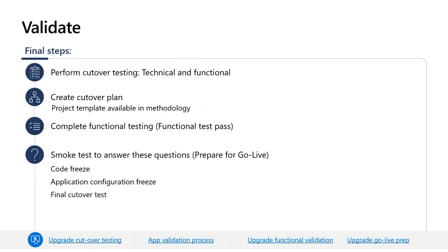Functional work stream. So after data upgrade, several configuration tasks will be required in the FNO environment. All these tasks must be documented and quantified, and a resource must be assigned to them because they must fit together with the technical tasks within the business downtime limit.